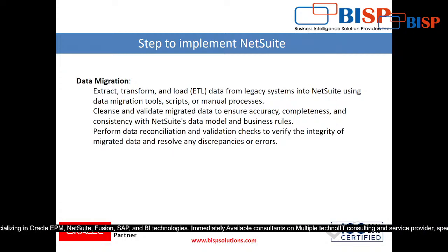You have to validate that data, because many times during transformation some important information is deleted. In that case, we do some type of testing, that is called validation. Validation means, for example, the sum of all the sales order amounts of this particular month, February, is $20,50,000, right?